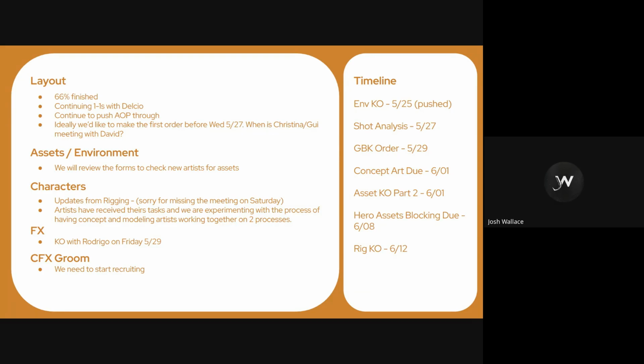And then CFX is going to be a big one. That's cloth and character effects. Demon Pope is going to be very heavy in terms of cloth simulation, so we're going to need someone quite experienced, quite senior to take on that. And then Lavina is going to need CFX. Some of the 404s will need a light pass of CFX for the ones in the dark, and then the hero will also need it. So we're probably going to need four or five CFX artists, at least one senior for Demon Pope, and then Groom, I would say at least three.